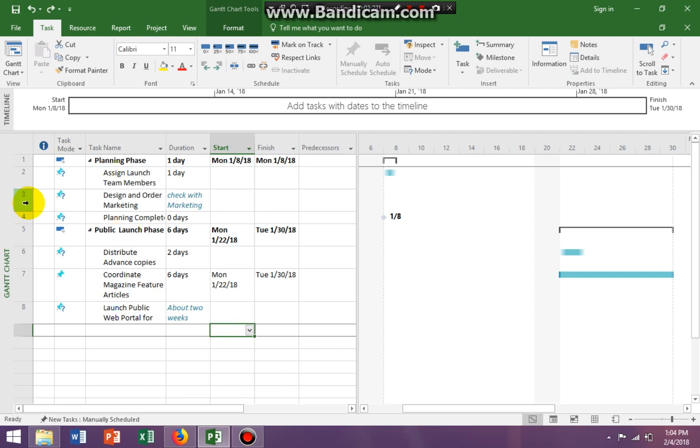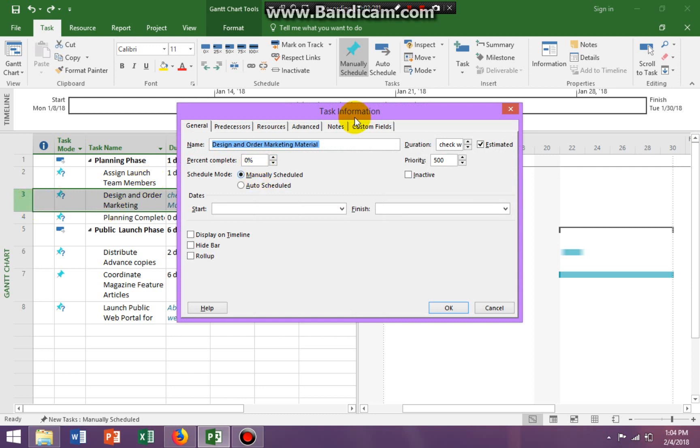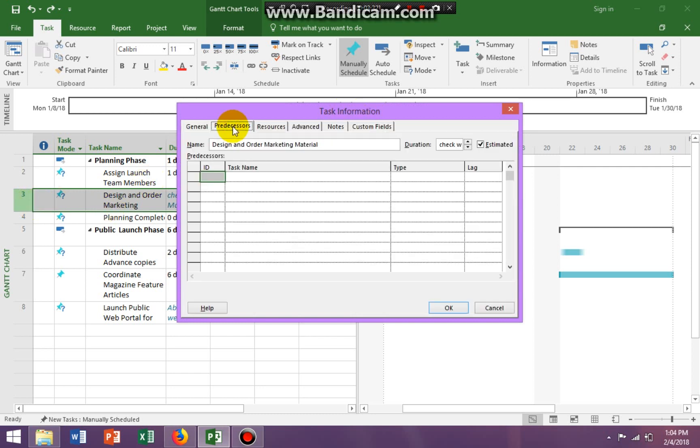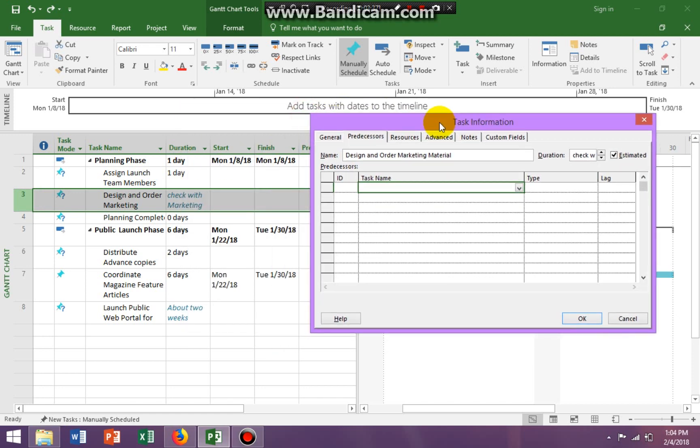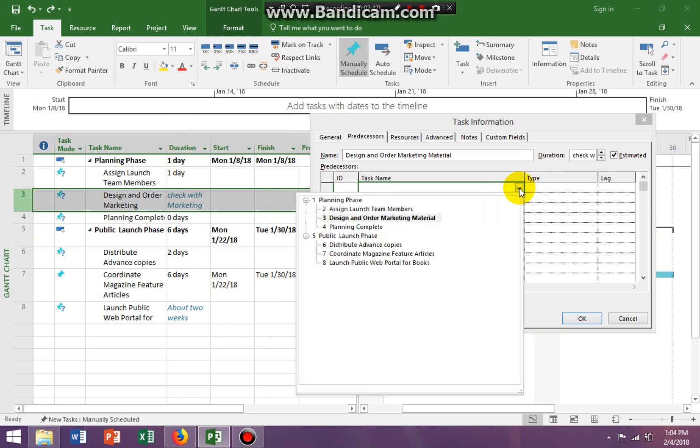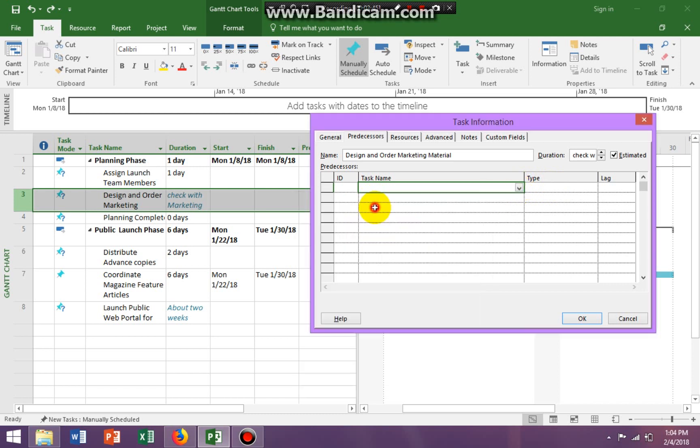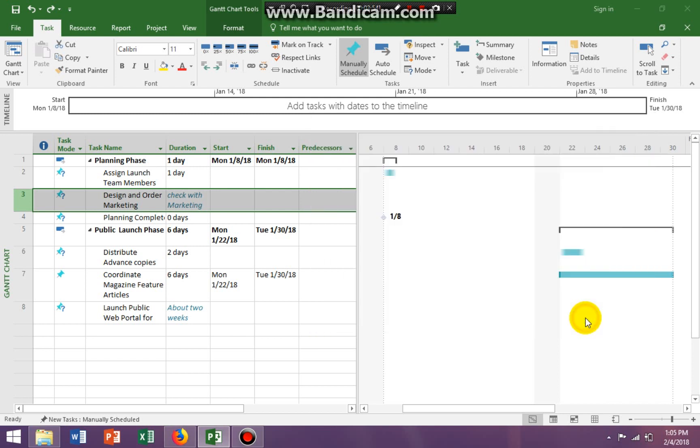So your book is asking you to double-click on your third task. You're going to double-click on it. You're going to get your task information box. You're going to click on the predecessor. And what you're going to do here is the task name. You want to link task 3 to task 2. So you want to actually be in task 3, but then assign task 2 to it. Finish to start. I believe they asked for finish to start. And there you go.